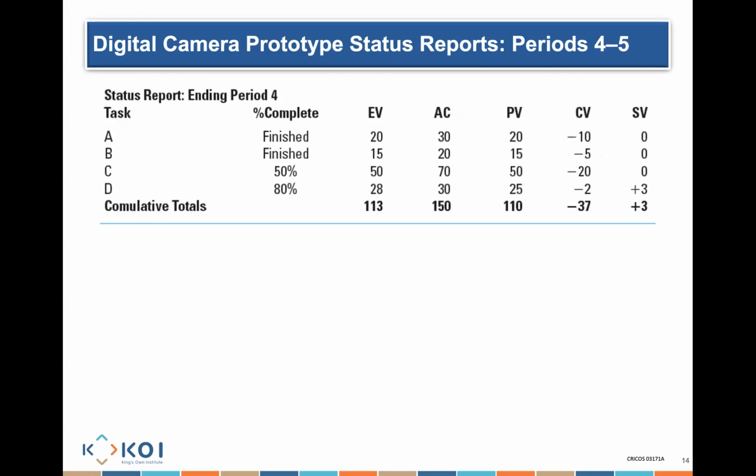Oh, given. In real life, you will know the actual cost. Let's say you have an employee, and you know that your employee will have to be paid $1,000 a day. So if you use that employee for 2 days, 3 days, 4 days, you'll know the actual cost because you already know the cost for that person per day. Does that make sense?